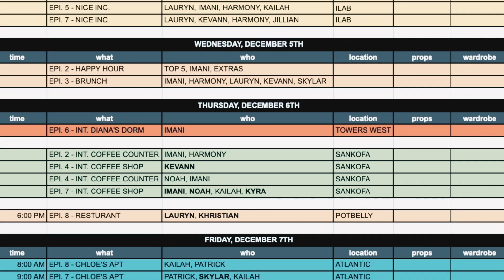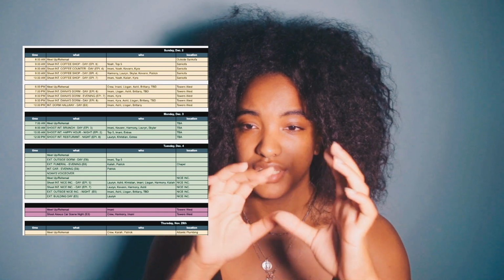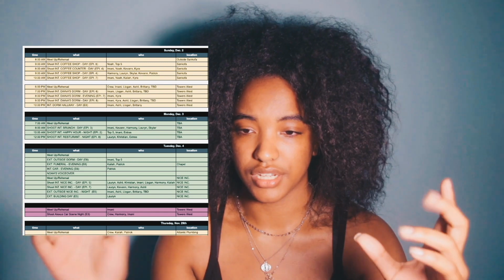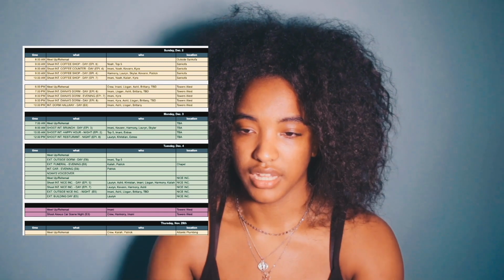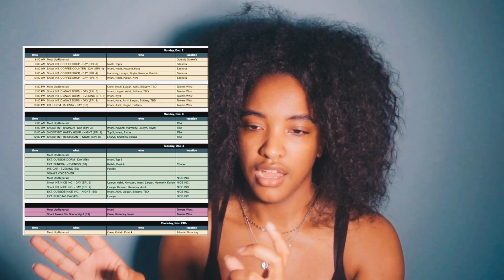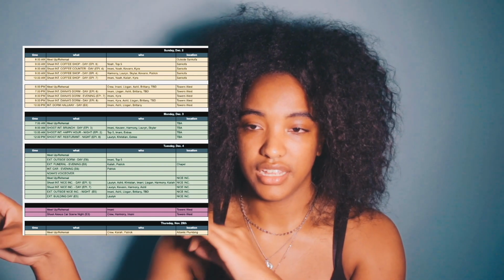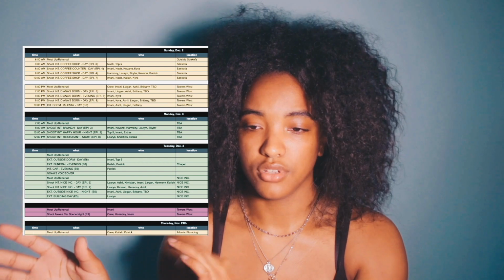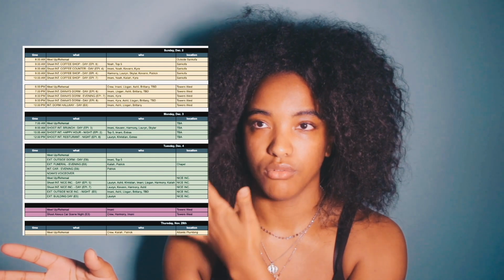But the biggest thing I'll do is get everyone's schedule, and once I got their schedule, I would go into an Excel sheet or Google Sheets, and I would type up a master schedule for the filming for that week. We're gonna shoot the first scene, it's gonna be in the coffee shop, and I'll put the address to where we're shooting it. I'll put who I need in that scene, which episode it was, so they knew which episode to go over and what scene we're doing.